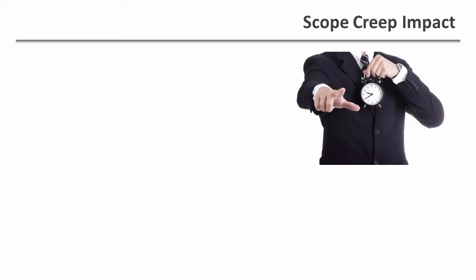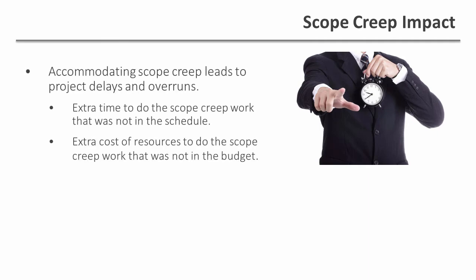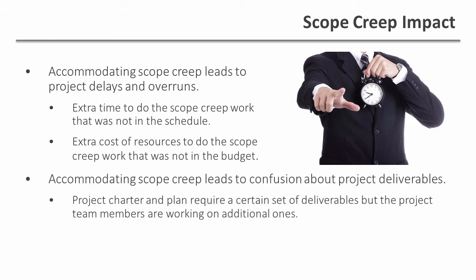Let's look at the impact of scope creep on a project. Scope creep inevitably leads to overruns and delays in the project. That's because the new work consumes resources, but those resources were not budgeted for that work. Paying for the increased work creates an overrun. Also, when the project resources are on the scope creep work, their assigned work is normally delayed, leading to a project delay.